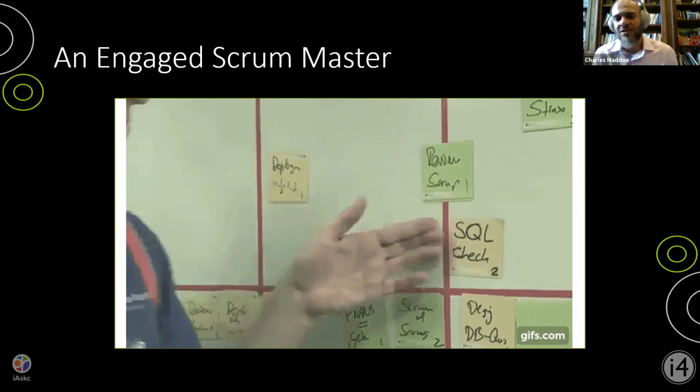Because you could also imagine that at scale, the team now has a misrepresentation about their actual status and progress. Think about how that impacts integration across the entire system. It could potentially be looked at as this team has been fully integrated, they're fully done, they're meeting the full done criteria. And then that impacts another team's ability to effectively plan and integrate and deploy their solutions into whatever environment they want to go into next.